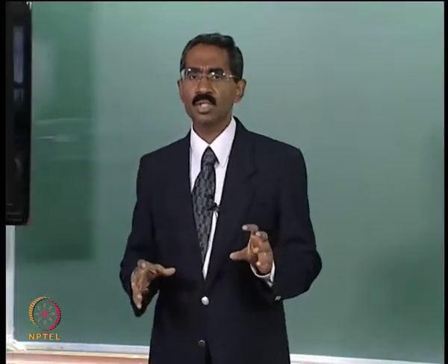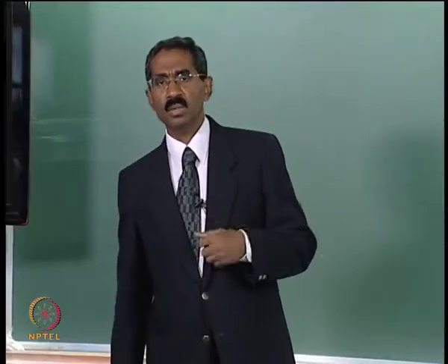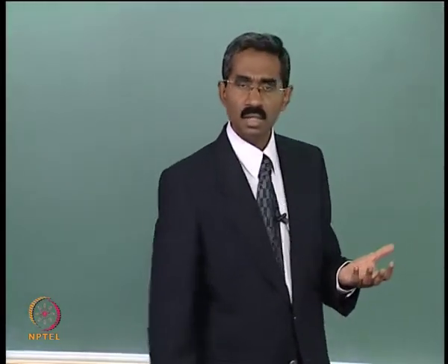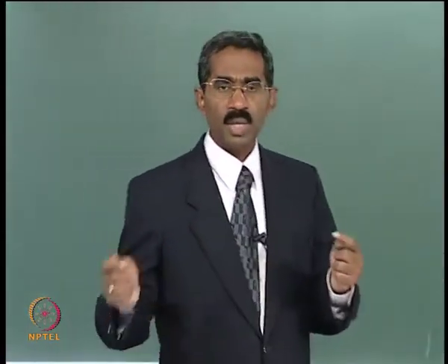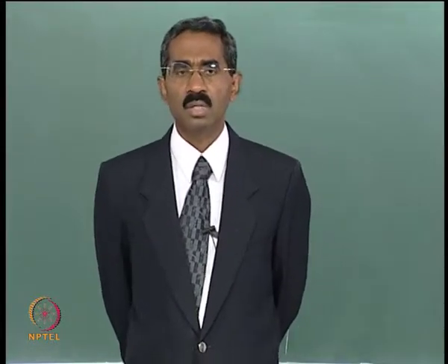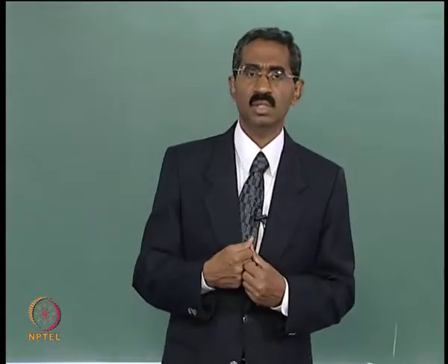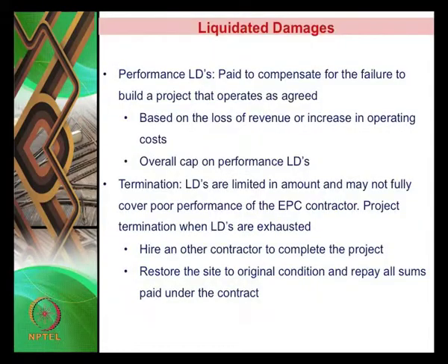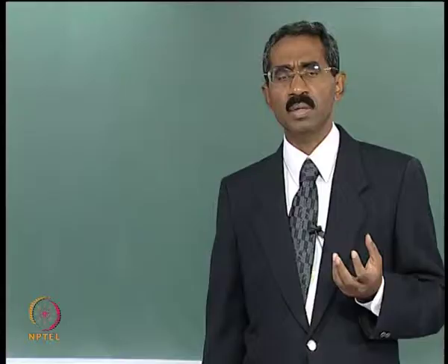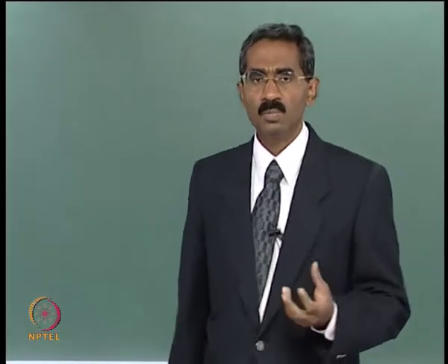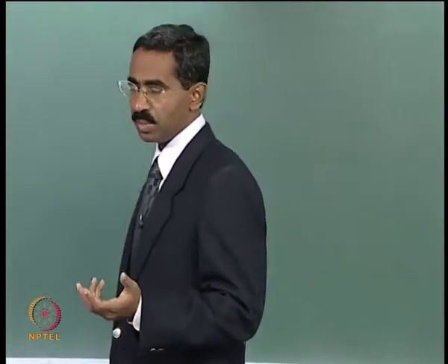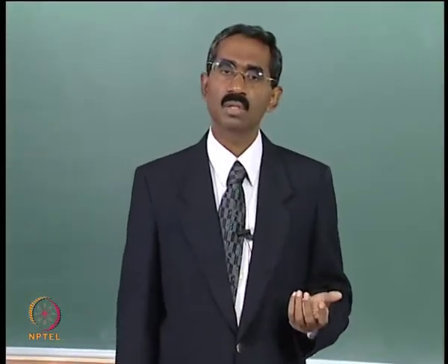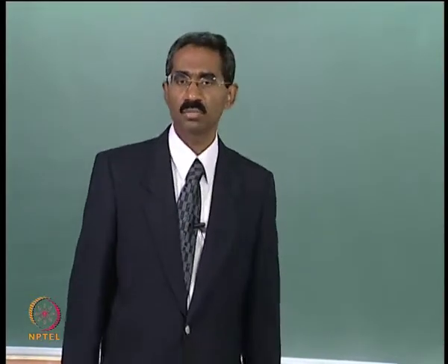So whenever there is a termination, what happens? The project company goes ahead and hires another contractor, and the EPC contractor is expected to pay the additional costs incurred in hiring the new contractor. The EPC contractor provides various bonds and guarantees in securing the contract. So whenever the contract is terminated, all these bonds and guarantees are utilized by the project company to meet the costs of the new contractor that is going to be hired for completing the project.